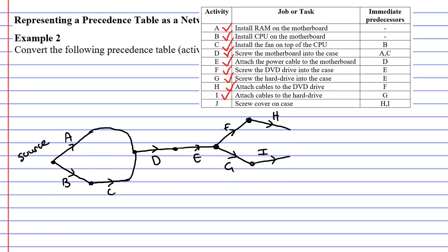Finally we have activity J. Activity J comes after two activities, activities H and I. If I was to draw an edge to represent activity J, I would need a vertex at the beginning of it to represent the completion of any immediate predecessors. And those immediate predecessors are activities H and I. So I need to extend those edges to meet at this point like so.